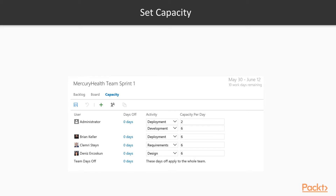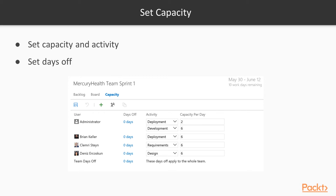Lastly, we're going to talk about setting capacity and the activity within TFS. It's pretty straightforward — in a sprint, you add the users and the capacity chart knows what users you have. You put in the activity they're going to be doing, their capacity per day in hours, and even days off — so you can account for vacations or planned absences. With that, let's go look at setting capacity and sprint dates within TFS.